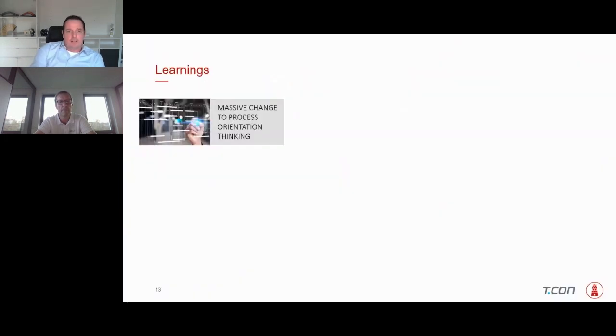Yeah, there has been lots of learnings, Reinhard. To be honest, I think at the end we had about 3 pages of learnings which we have gained through Easy Germany. Like you mentioned, it was 5 mills, and we recognize that this process thinking, which I mentioned at the beginning, which we wanted to be implemented in the company, has been a massive change for everybody working in the organization. Not just thinking about what you are doing on your own, but also thinking about what is happening in the steps prior to you and after your job. That has been a massive change, and we recognize that the change management for these kinds of projects is absolutely necessary. So one decision which has been made after the Easy Go Live in Germany is that with these kinds of projects, change management is absolutely necessary and needs to be part of the project.